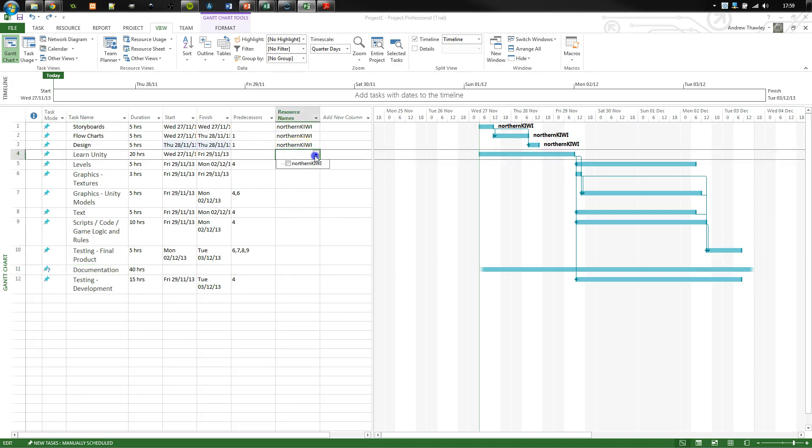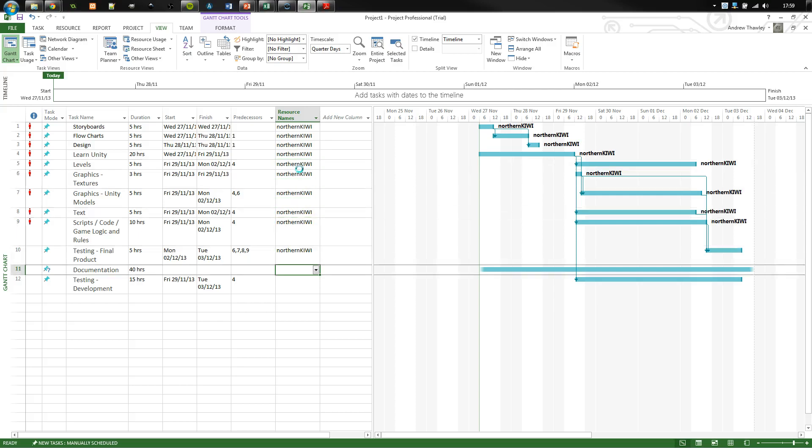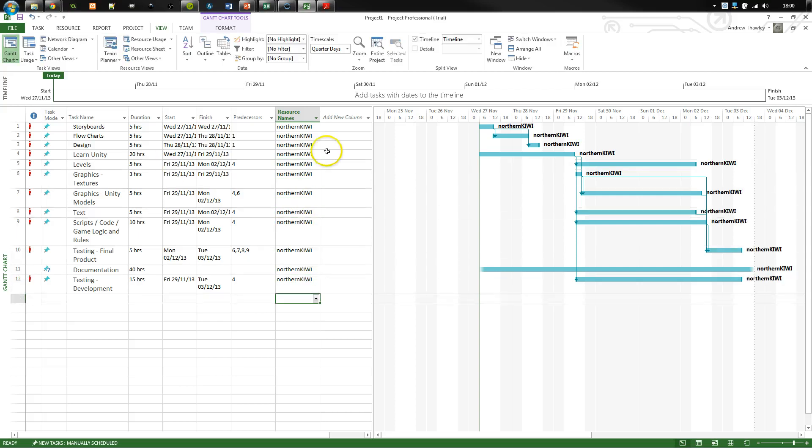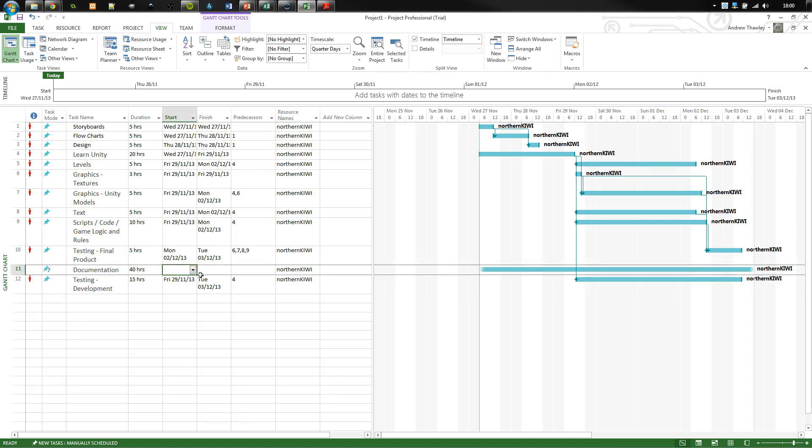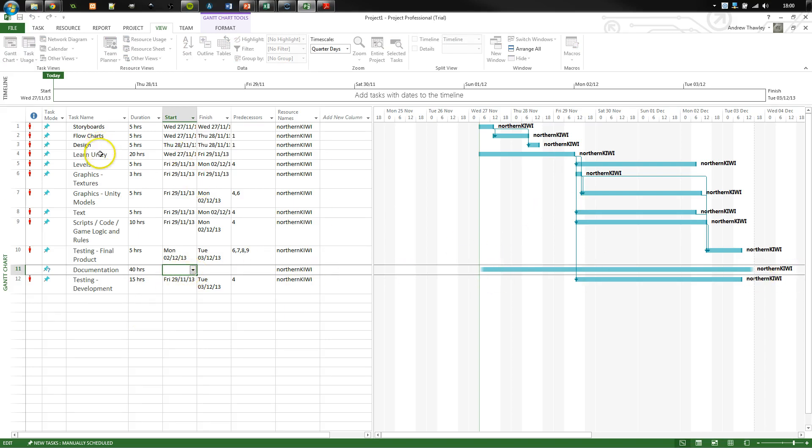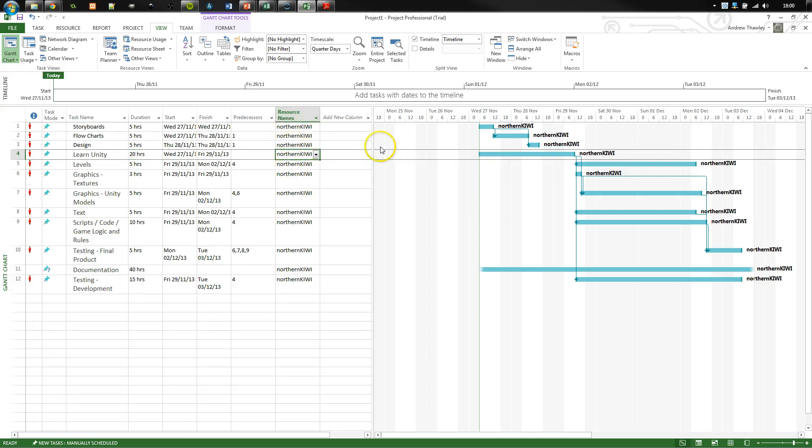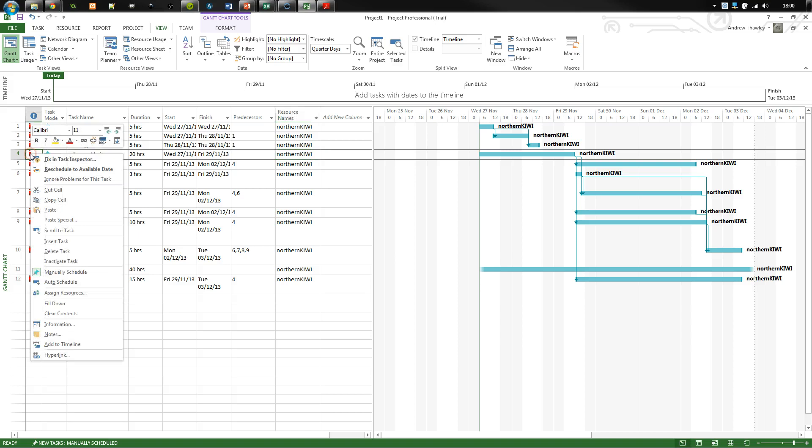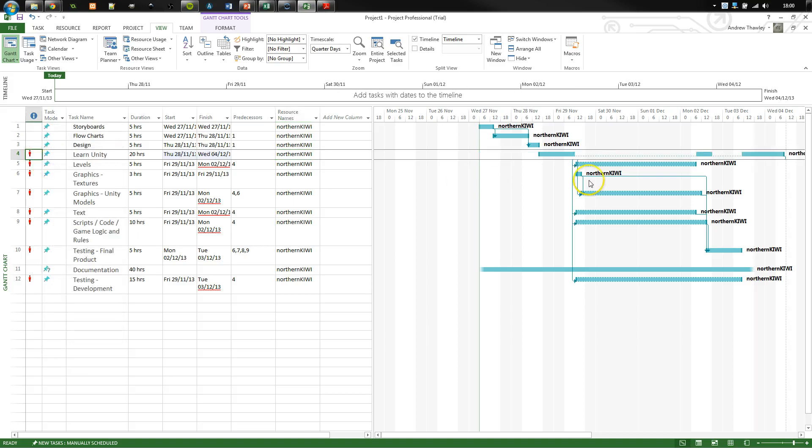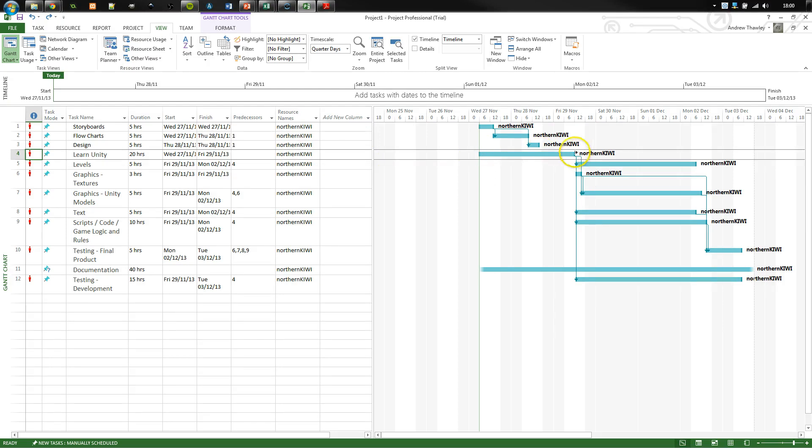Now I can continue to allocate all these resources all the way down. Shortcut is you can just use the letters. Now we've got all these tasks that have gone through and allocated. My documentation, I probably actually need to give that. I'm actually going to leave those sort of start dates out because I just want to leave it nice and open. Now, one of the problems is it is a little bit hard to schedule the two things when we can actually work on at the same time. So you might want to actually add a second resource for you part one, you part two. Because in real world scenarios, you're probably going to get one person that's just going to be in the storyboards and these other tasks. But obviously I can go through and reschedule these different things to start up. So I might have my development side and then my maybe training side. And that training resource may be only available for that first period when it can be worked on at the other time.